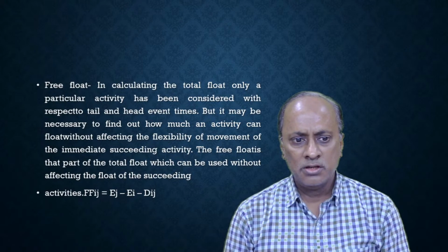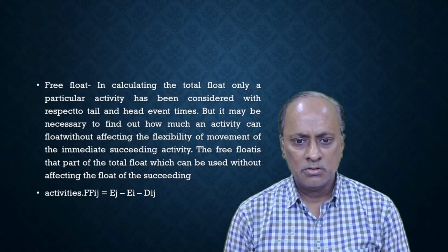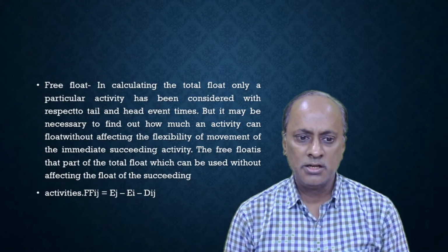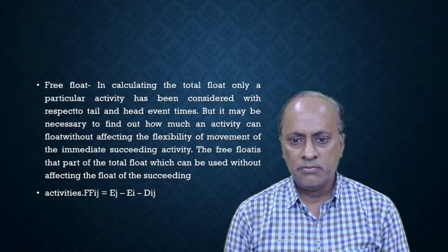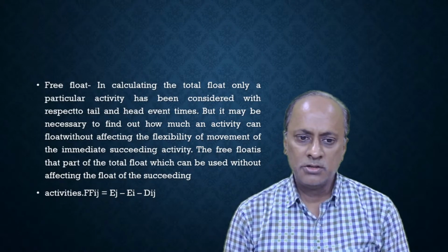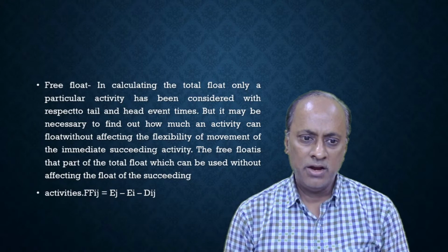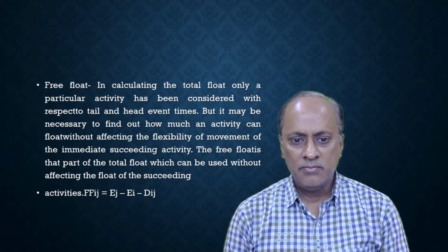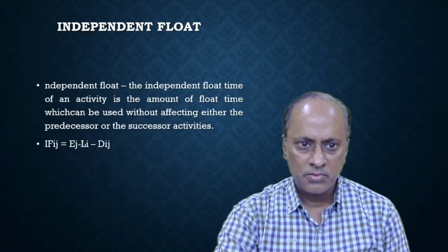The free float is that part of the total float which can be used without affecting the float of the succeeding activities. So the last line is very important: the free float is the part of the total float which doesn't affect the float of the succeeding activities.